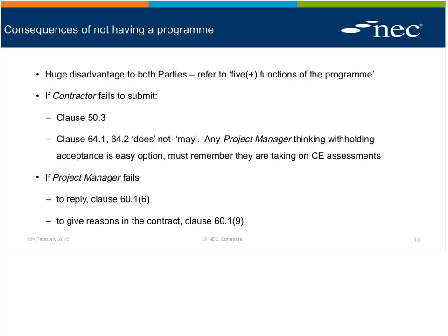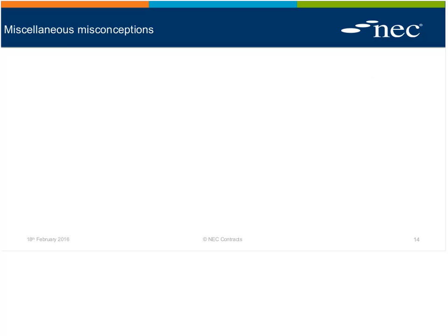We're short on time, so the last little thing before we move to questions was for me to just identify some of the misconceptions around programming. So, miscellaneous misconceptions. There's no silent acceptance. I don't know if you spotted this in some of the exams, but people have deemed acceptance. People seem to think that silence is acceptance.